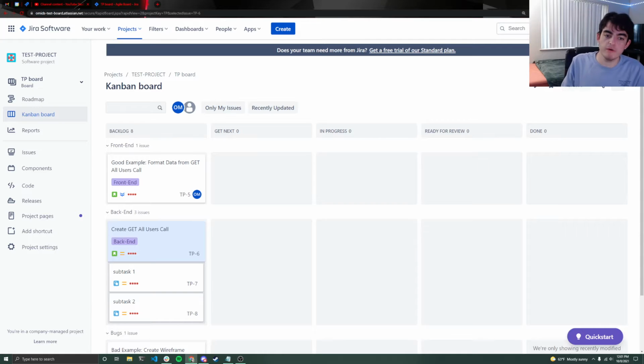And this one we'll be focusing on how to focus stories on one specific task. So when we create user stories as project managers, one of the biggest mistakes that usually occurs is creating very large stories that just have a lot of stuff inside of them. What I mean by that is you can create a story thinking, oh yeah, I just need this one simple feature built. It looks pretty straightforward, probably just take us like 2-3 hours of work.